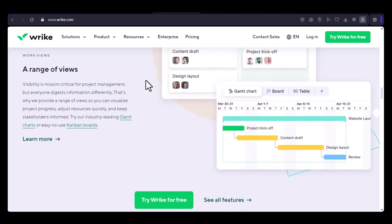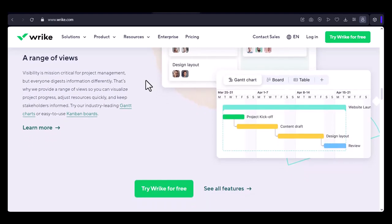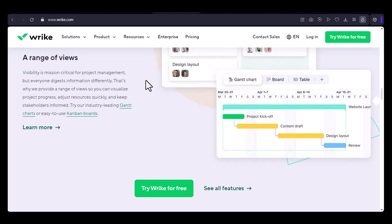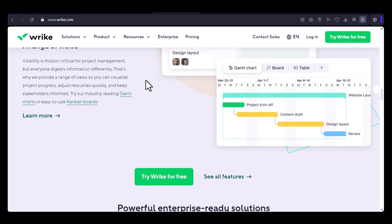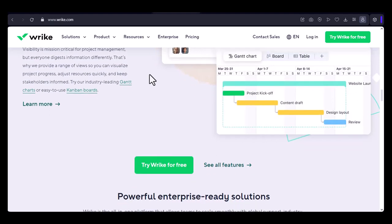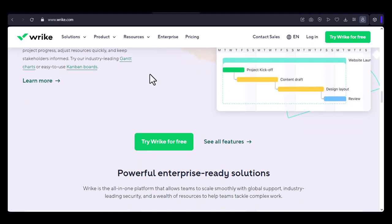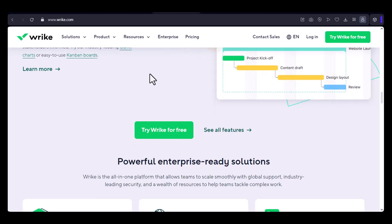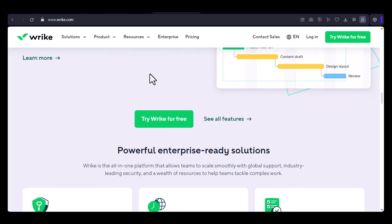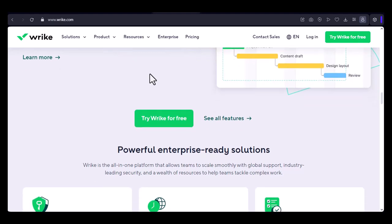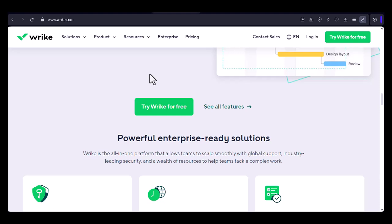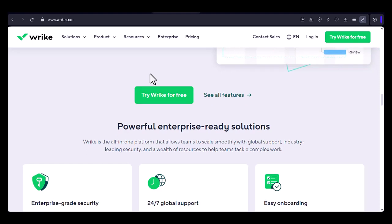Mapping fields. Once you've selected your source, Wrike will prompt you to map fields. This means matching the fields from your original project—task name, due date, assignee—to the corresponding fields in Wrike. This ensures that your imported data is accurately represented in your new Wrike project.